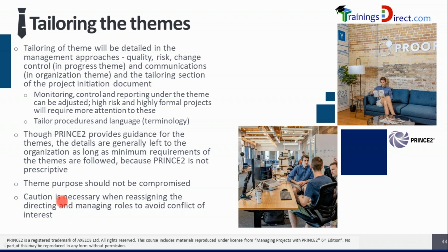Therefore, the roles may be combined as long as there is no conflict of interest between them. So caution is necessary when roles are being combined or reassigned. For example, the project manager cannot be a member of the project board. We will learn about those things afterwards.